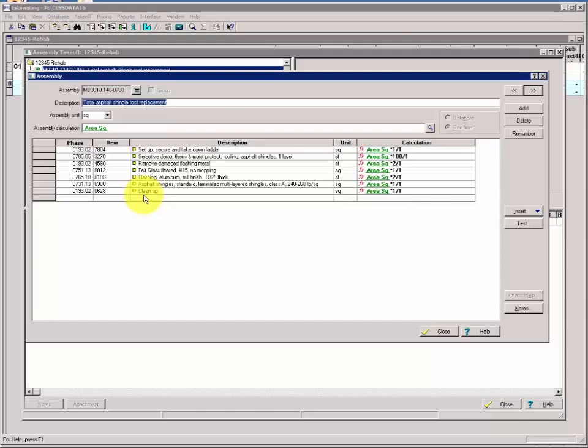Traditionally, assembly builders have ordered the items in their assemblies in the order you perform the work. So typically at the beginning of a roofing job you would secure access, a ladder or scaffolding, and at the end of the job you would clean up, with all the various components going in between those two things. We'll keep that same format. So our setup and takedown of the ladder is good. Removing the shingles themselves, we'll keep, removing the flashing. But after that, before we put the waterproofing on the roof, we're going to insert all the framing members between these two items.